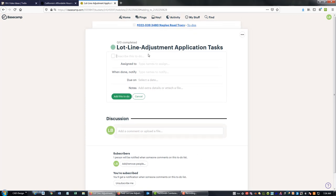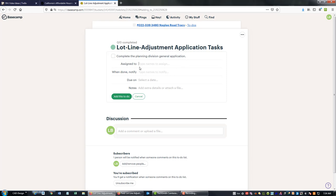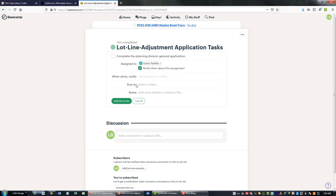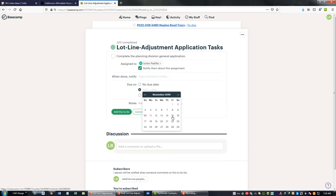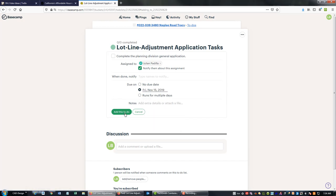Okay, and then I want to go ahead and add some to-do's to this. We've got a first item here: we need to complete the planning division general application. It's one of the things we need to do and we're going to assign this to Julian, and we're going to say we want to make this due on the 15th. Let's see here, should be able to download and attach the form, so let's do that. We can just attach it right here to the to-do.